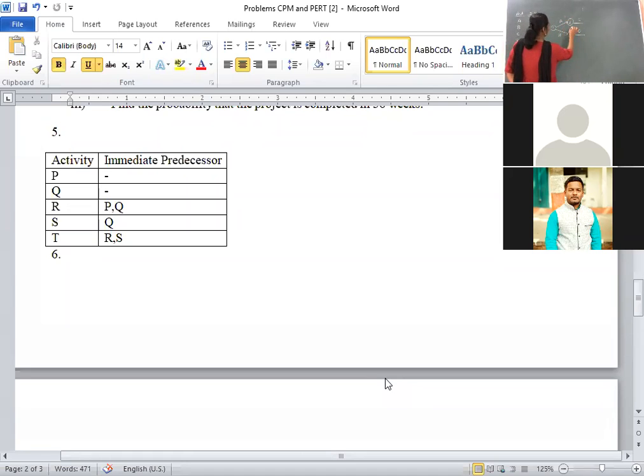Okay, dummy activity is always represented by, here activity D is already there. That's why dummy activity we will represent as D1 of 0. This activity does not consume any time. That's why we will represent as D1 0. For example, two dummy activities you are introducing, then we will represent it as D2 0. Three activities, D3 0. Like that we will represent. Any query?